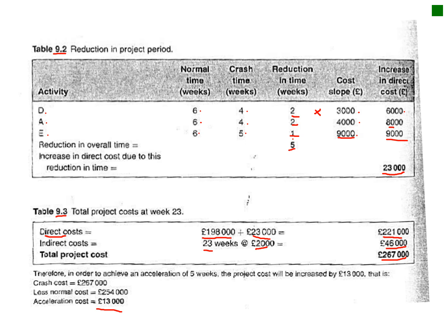Okay, going to scenario 2. Now we're going to look at the optimum time reduction. So now we're going to look at the effect on the project cost for each week's reduction in time in order to assess the least cost situation. So the change in the direct and indirect costs due to each week reduction in the project time is indicated in 9.44. The relationship is presented in graphical form in 9.45.